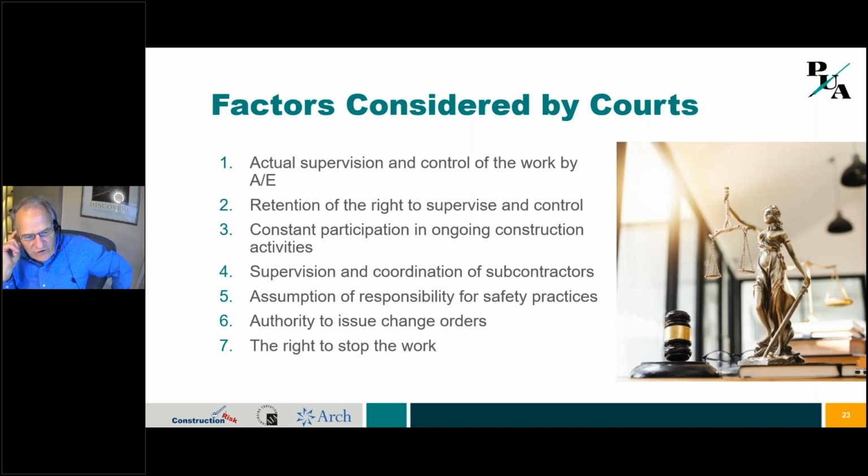Okay, what are the factors that a court will look at in deciding whether you have site safety? They look at, did you supervise and control the work of the contractor? Did you retain the right to supervise and control the work? How much participation did you have in the ongoing construction activities? Were you there every day, or did you just go out every week or two to look at the project? Did you supervise and coordinate subcontractors on the project? Did you assume any responsibility for the safety practices that people were using?